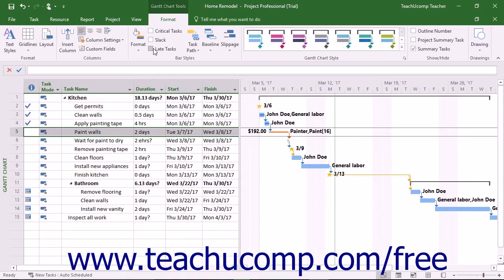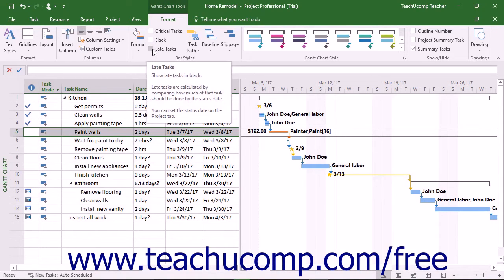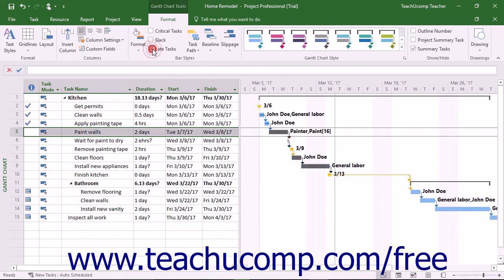You can also check the Late Tasks check box to display Late Tasks in black. Late Tasks are calculated by determining how much of the task should be done by the status date.